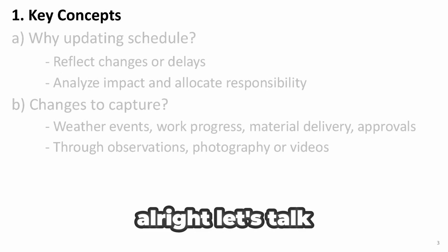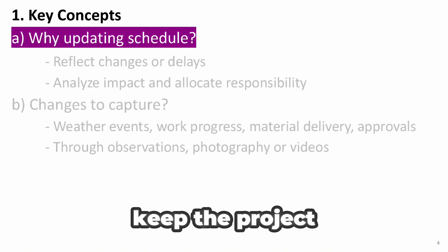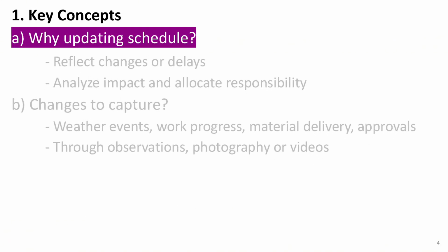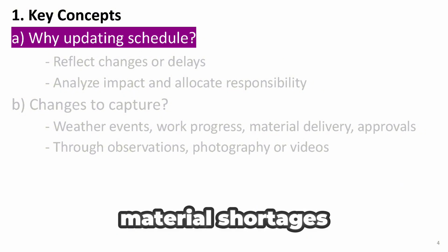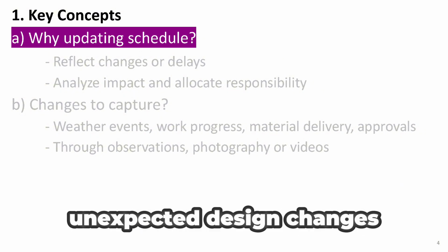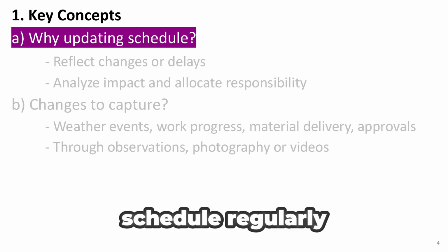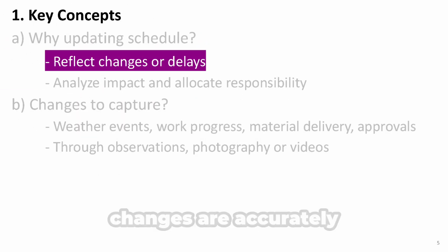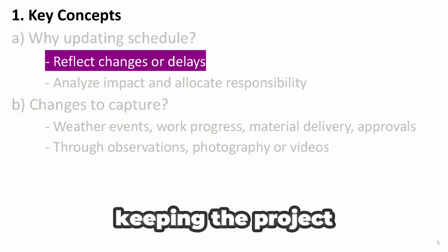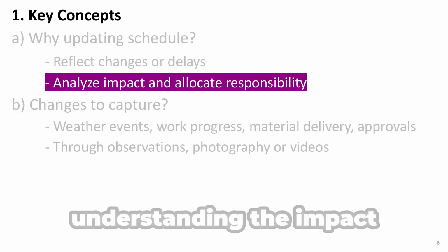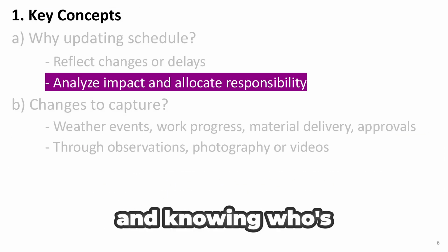Alright, let's talk about why it's so important to keep the project schedule updated. You see, projects are always evolving, and things don't always go as planned. There can be material shortages, labor issues, or unexpected design changes. By updating the schedule regularly, we ensure that all of these changes are accurately reflected, and we stay on top of the situation. Keeping the project schedule updated is crucial for understanding the impact of those changes and knowing who's